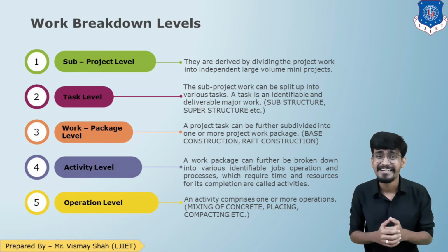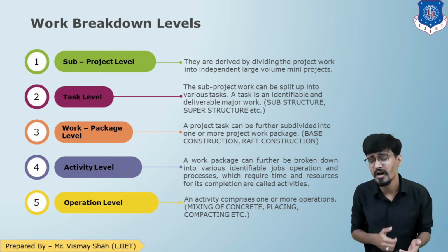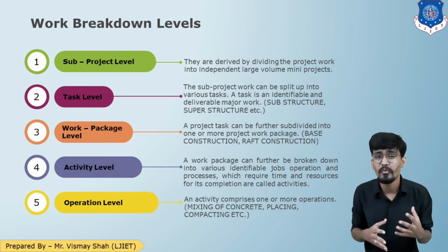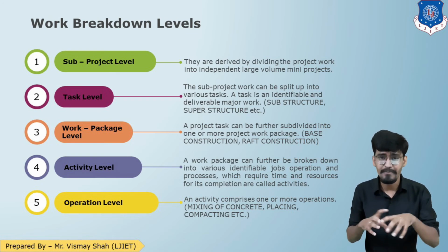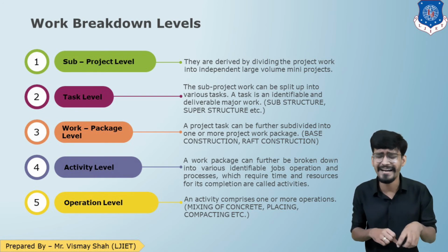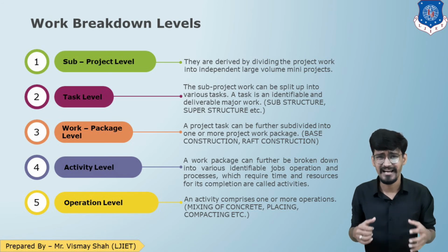The next is task level. The sub project work can be divided further into task level. The tasks are the major work deliverables. For example, in a township, there is a residential building. Now you can divide it into substructure and superstructure. So that is a task level.